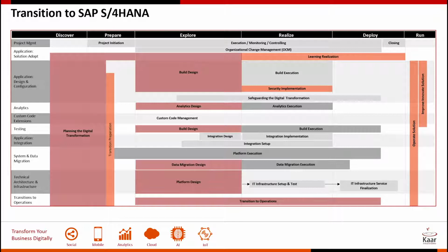The testing work stream. This covers identifying the test scenarios, the test cases, the planning of the tests, the execution of all the tests, including the integration, regression, and the user acceptance. From our experience, we suggest that you run extensive performance tests on the production hardware with full load and on the final setup of the production hardware, because you don't want to be in for surprises when you do your ramp up and you realize that the production hardware is sinking.